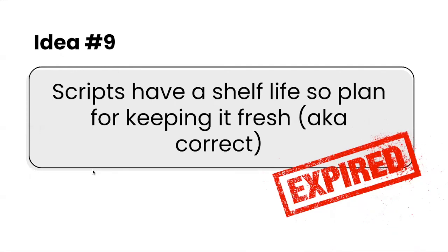So often when you're creating a chatbot project plan, you're just working on getting it to go live, but you do need to have part of that plan: how are we going to maintain the scripts, and how are we going to identify which ones need to be kept up and kept fresh? That requires a little bit of project management, but it's important, because if the chatbot, a new and innovative platform, ironically starts giving old and outdated data, that's not going to go over so well. Because scripts do have a shelf life, make a plan for keeping it up to date.